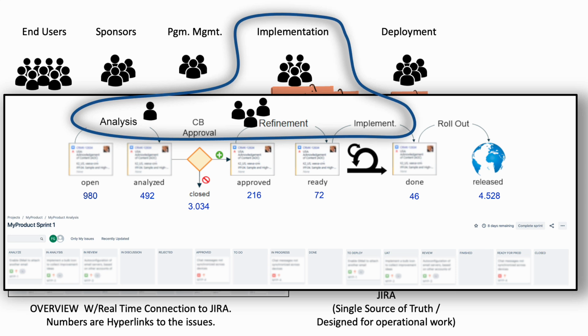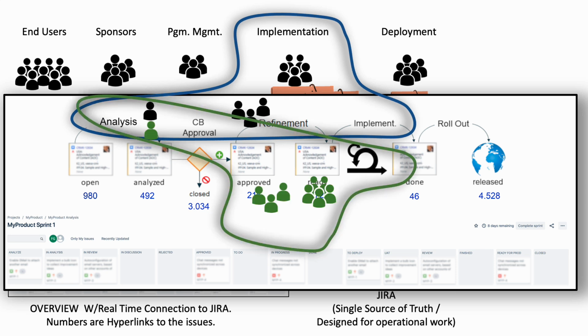At the same time, there could be another team, like in this case the green team, where a deputy of this team is also collaborating in the analysis with a member of the black team. And together they are slicing the epics into features and the features into user stories, and they are collaborating at this level, but they are also remaining accountable and in connection with the corresponding team, so they can track the progress of the items all the way downwards until they are deployed into production.